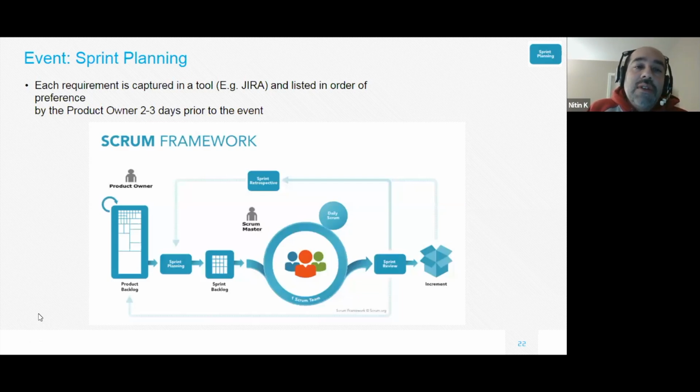This is something that is also time boxed. As we say, it's held consistently at a certain point. They say don't start a sprint on a Monday, don't end a sprint on a Friday. So your sprint planning is going to be somewhere around Tuesday, Wednesday, Thursday. And the reason for that is long vacations or people working remotely on Friday.